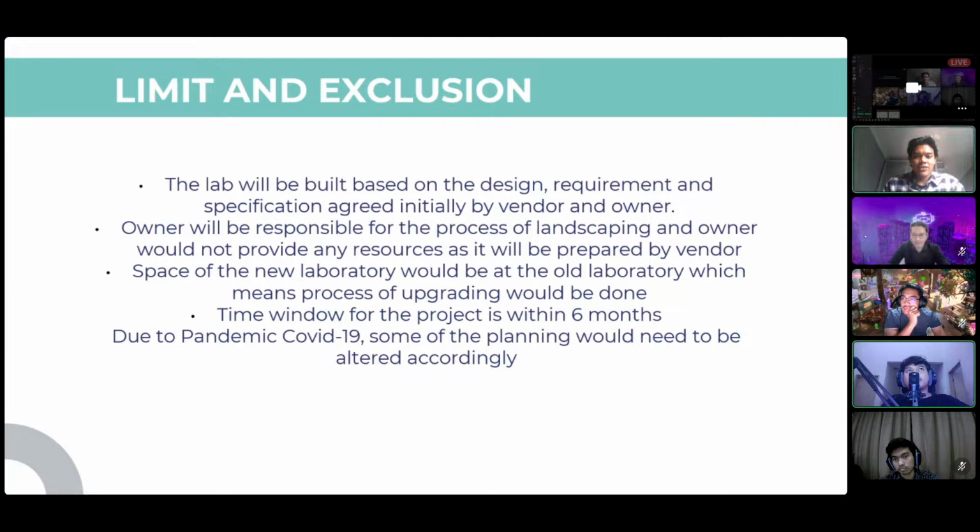Alright. So this is the limit and exclusion for our project. The lab will be built based on the design requirement and specification agreed initially by the vendor and the owner. The owner will be responsible for the process of landscaping, and the owner would not provide any resources for the project. The space of the new laboratory would be at the old laboratory, which means the process of upgrading would be done there. The time window for this project is 6 months, but due to COVID-19, the planning would need to be altered accordingly.